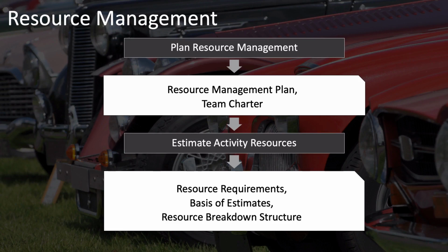Do you remember the organizational breakdown structure? It's kind of a hybrid between the work breakdown structure and the resource breakdown structure. It takes the work breakdown structure and reorganizes it so that each work package is under the appropriate department or division or team of your organization. It basically follows your organizational structure so that each unit, department, division, or whatever in your organization can consult with the organizational breakdown structure, look at their section, and see what work they're responsible for.